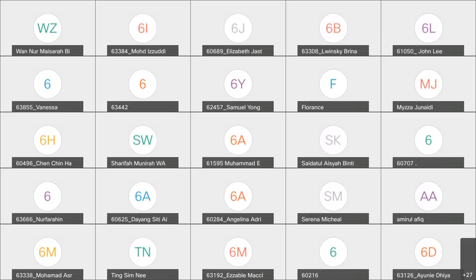So basically what is expected is that you need to do your proper work breakdown structure. From your work breakdown structure, you need to do your resources planning of manpower, machineries, materials and others. Then you need to do your time, which is your scheduling, your productivity rate from your resources, and then your scheduling.